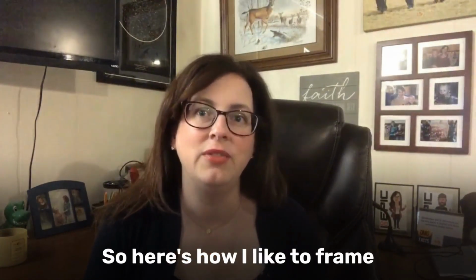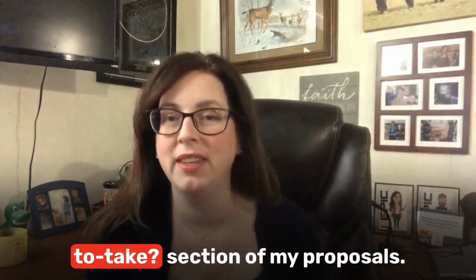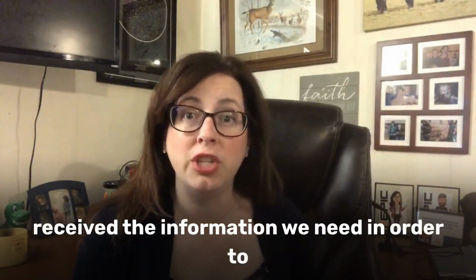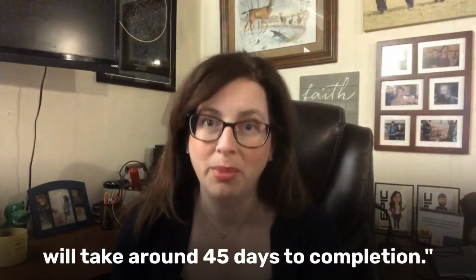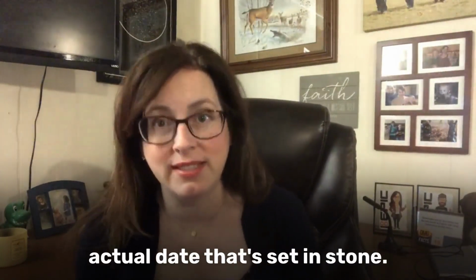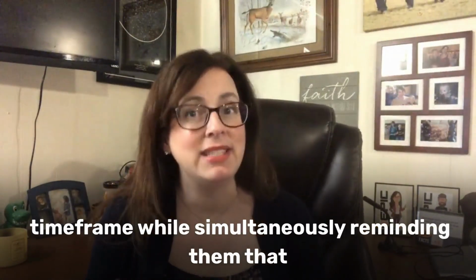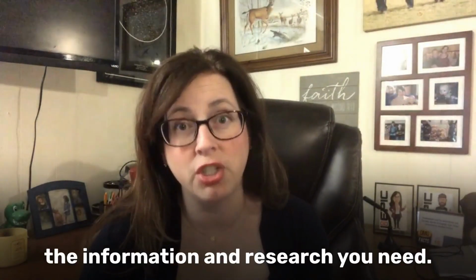So here's how I like to frame the "how long is this going to take" section of my proposals. Work begins as soon as your initial deposit is paid. Once my team and I have received the information we'll need in order to get started, you can expect that this project will take around 45 days to completion. Simple, right? You're not giving an actual date that's set in stone. You're providing them with a ballpark, reasonable time frame while simultaneously reminding them that some of it depends on how well they work with you to get you the information and research you need.